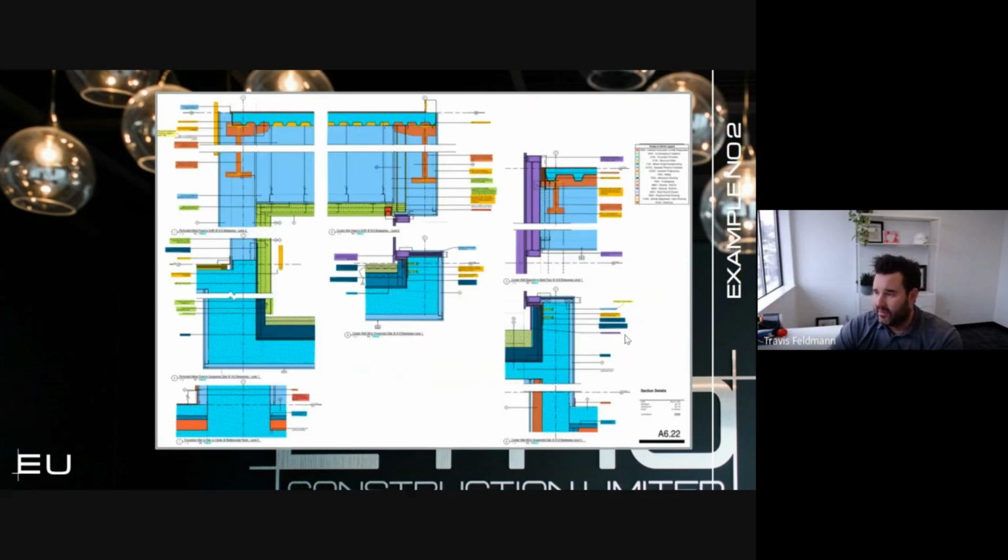At a high level, this is kind of the end product. You want to make sure that all the notes are tagged so the specific trade knows that they're picking up that scope of work as far as the assembly, but then the applicable note that goes along with it, just so we're, again, belts and suspenders as far as our level of communication with the trades, noting that we've gone through every note, every detail, and made sure that we're providing a complete set of drawings that are scoped out in a way that we intend to build the project.